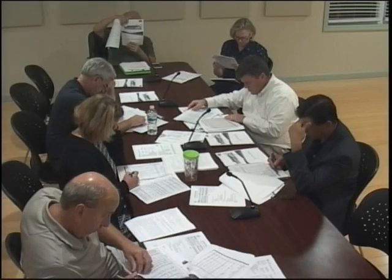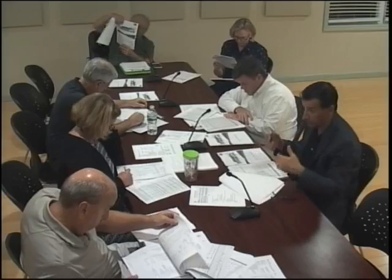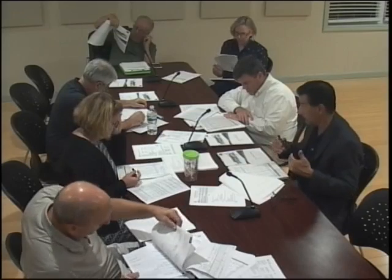The bottom number, if you look all the way down to the bottom of the sheet, where it says item 6, contingency. Contingency A is construction and owner project contingency. And then you have that line item that says additional need. So if we ever run into a problem where we need money, that's where that number will show. That additional need right now is in the positive of $167,000. So you can always look there and see all the pluses and minuses from furniture and geotech and LSPs, construction, everything else that goes on. That is your balance as we sit.